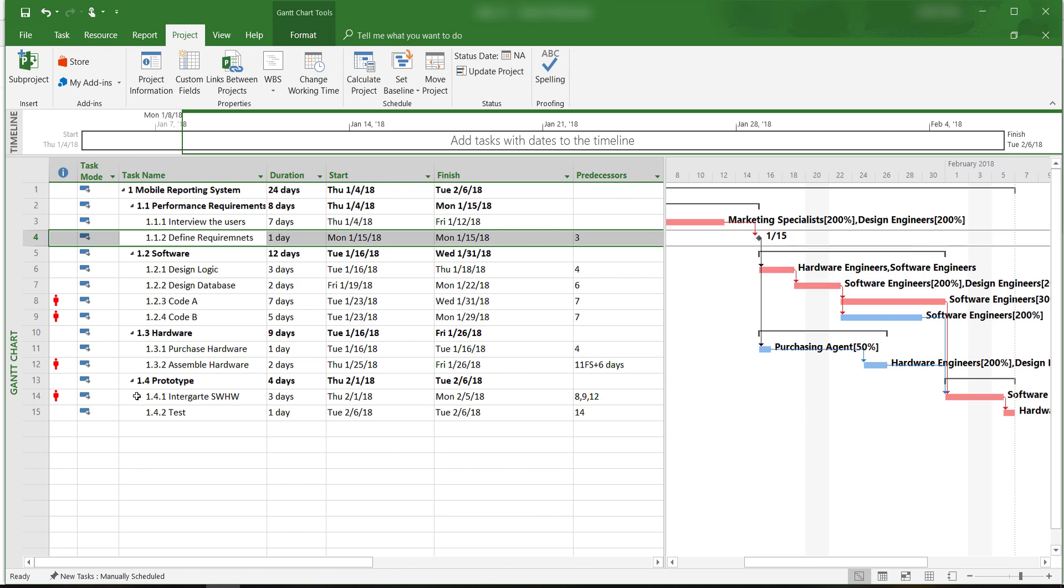Activity 14, Integrate Software and Hardware, is a critical merge activity and it's the successor of activities 8, 9, and 12. The start of this activity is a milestone.